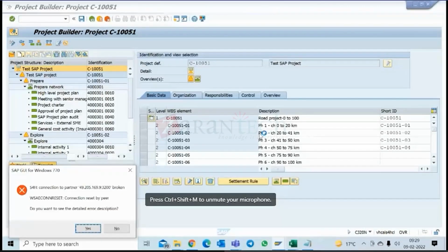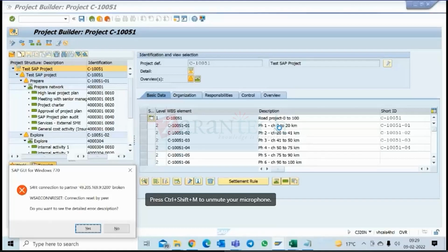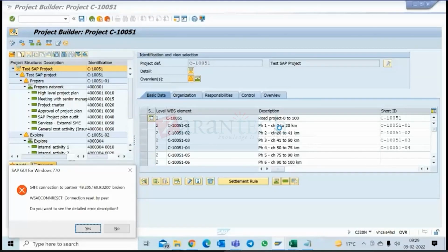Like this, then after this, level 2 will be a further breakup. What happens in a road? If you see road construction, and there is already an existing road, then they will open up that road, dig that road. That will be maybe the first level WBS. After this, level 3 WBS, there will be laying.